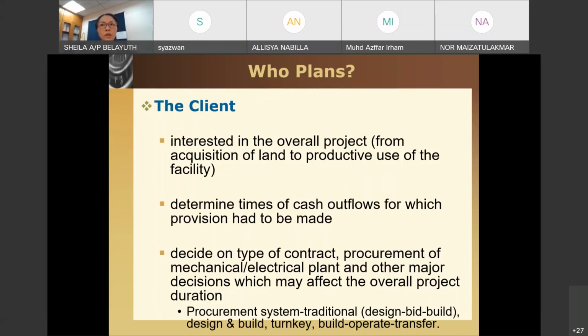Okay, so itu yang concession period tu. The duration for concession, 10 years, 20 years of operate tu. Okay, so that's why we pay the toll. So we pay the toll for the maintenance work and for the construction work that have been done by the contractor until the concession period is completed. If it's 30 years without any extension, then it's 30 years.